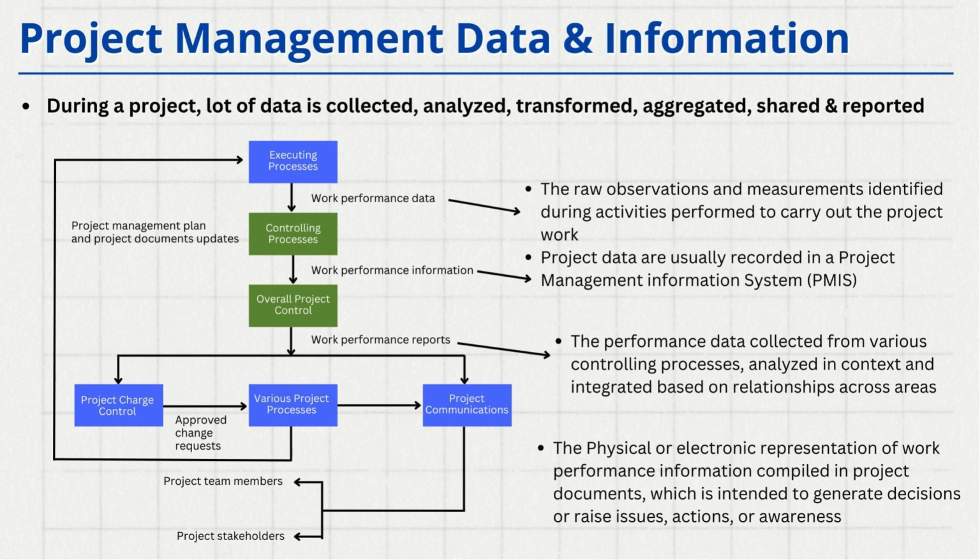Whichever tool you are using, typically what happens is that all the work performance-related data is captured as a part of the tool. So right from the planning activities to executing the activities and capturing the actuals, and maybe completion of tasks, all this information is captured. This tool, which is PMIS, or whatever tool you are using, actually helps. Now, based on that data, you will have to come up with the work performance information.